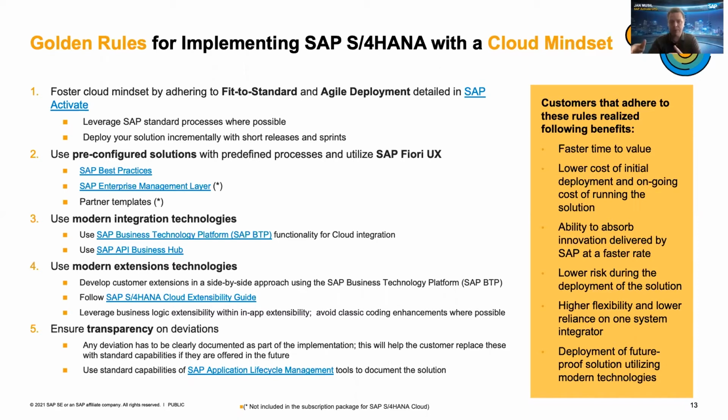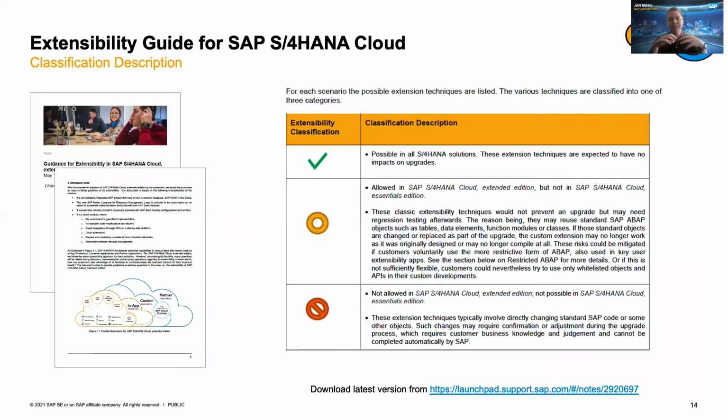It's fine if it brings you value, but document why, document what you did, because there may be a point in the future when SAP delivers that capability, and you want to go back to standard if possible. So there is a need for keeping the documentation. It's also good practice for companies that are using SIs to deliver these projects. An SI may leave at some point, and if you're left with no documentation and you need to maintain that system over time, it is hard. So those are the 5 golden rules. Again, I'm rushing through this so we can get to your questions.